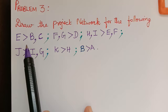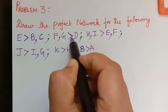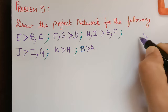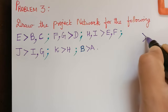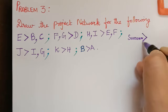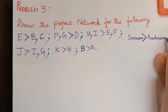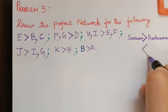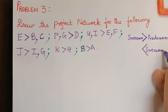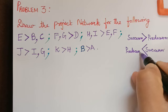Here it is given a little differently — they have used the greater-than symbol. Remember: whenever you have a greater-than symbol, whatever is on the greater side is the successor, and whatever is on the other side is the predecessor. This applies regardless of which direction the symbol faces.